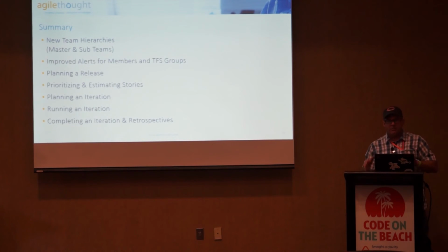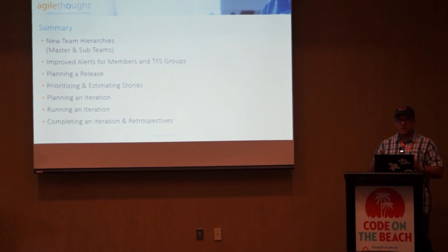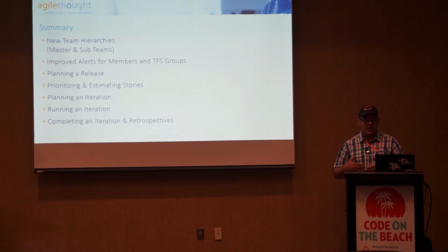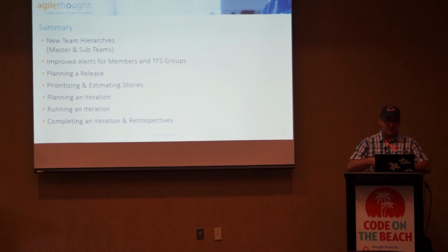I'm on the fence with that one. I think it should be tracked in TFS as a work item, because historically I want to go back and see what did we say. So what I do is I create a storyboard. Storyboarding is a way in which PowerPoint connects into TFS. I can create a PowerPoint presentation with 3 different slides: what went well, where can we improve, and what's our plan? I then create a work item at the end of each one, and I assign it, and I call it my retrospective work item. And I attach that storyboard to the work item.